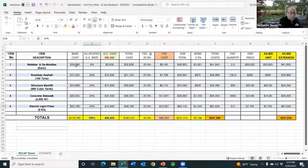So the spreadsheet takes the base cost times 4% of the green E4, and kicks out 2,658. There's the same thing for bid item 2, item 3, item 4, item 5. Again, it's multiplying the percentage rate times the GC cost, general conditions. So that's why the numbers are all the same for bid items 2 through 5. So down at the bottom, I see that I have now picked up and accounted for all of my general